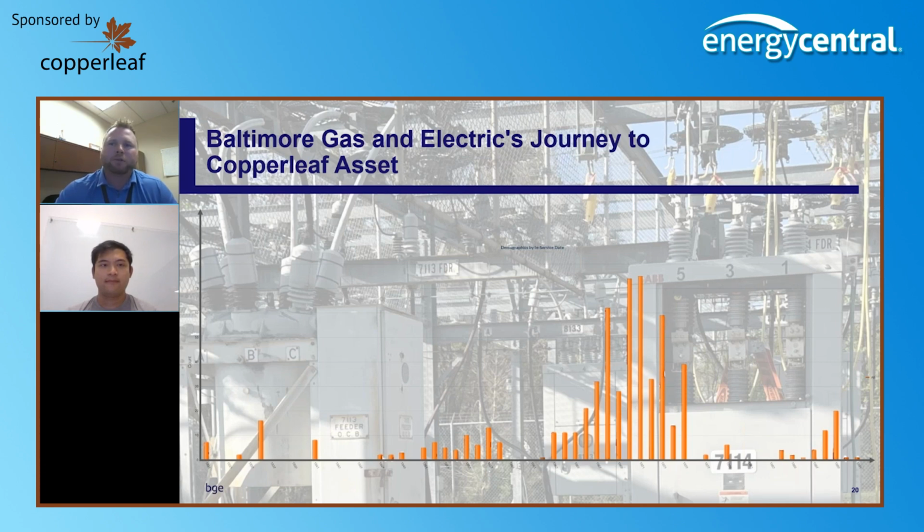And then from there, we were trying to figure out, all right, well, how do we operationalize this? How do we take this data and work it into a programmatic program where we did not want to be jumping from station to station? That was a strategy, I'd say a failed strategy, that we had tried in the past, which was to identify the 10 worst, and then you're in 10 different substations, right? And then the construction crews in the field are asking a lot of questions. I was just in that station, now I'm coming back 2 years later, I'm doing the breaker right next to the one that I was just at.